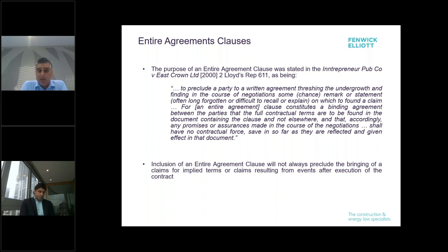For example, having an entire agreement clause will not affect a claim which is brought by a party to a contract as a result of events which arise after the signing of the contract. So remember, the entire agreement clause is only dealing with representations, etc., made before the contract was signed. The use of notes, negotiation, correspondence, and so on, may help and assist in interpreting the terms of the contract at a later date.